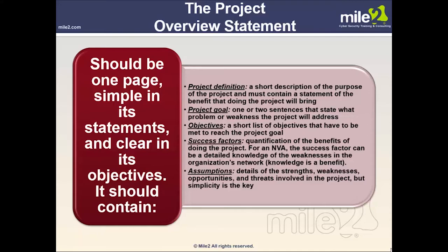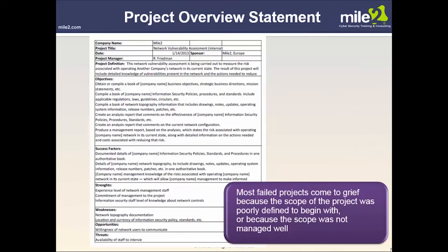The project overview statement must contain statements of benefit, a project goal of one or two sentences stating what problem the project will address, a short list of objectives to meet the goal, success factors such as quantification of benefits — for example, detailed knowledge of network weaknesses — and assumptions such as SWOT details. Simplicity is a big key. Everything should be defined, including project manager title and name, to assist in bringing the scope together.